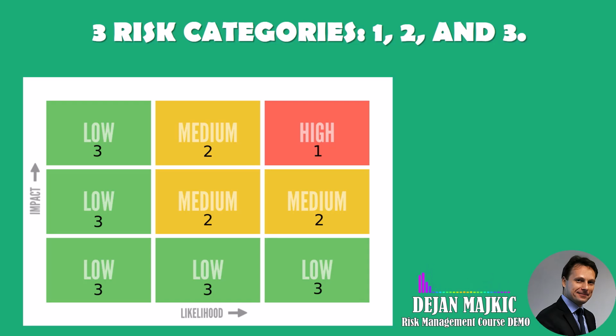Risks placed in category 2 are less severe but are still placed in your risk plan. These risks pose a moderate threat to your project, so any action that should be taken is planned seriously, but not to the same extent as the category 1 risks. And the category 3 risks are not planned much at all because they represent a low threat to your project.